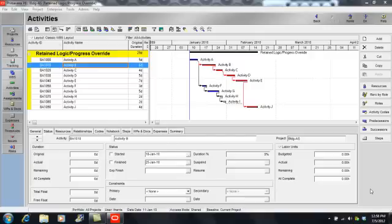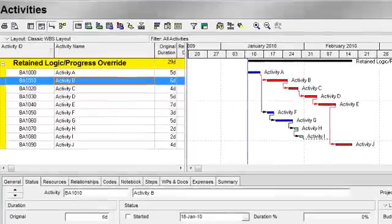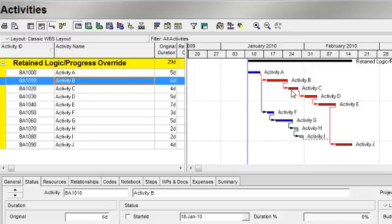In this example, we're going to focus on activities B and C. As we can see, activity B has a finish-to-start relationship with activity C. In other words, according to this network logic, activity C should not start until activity B is finished.